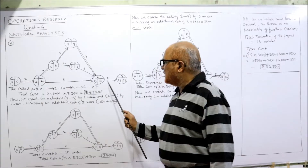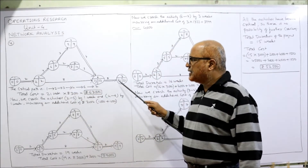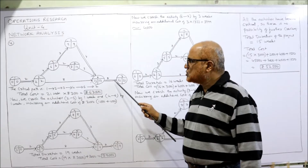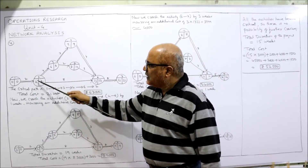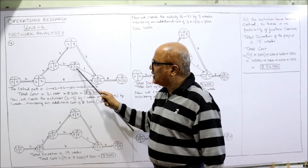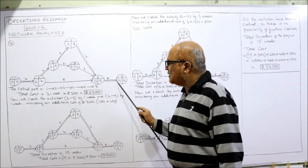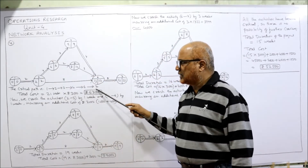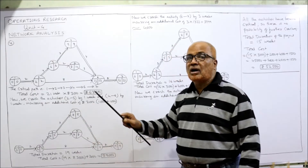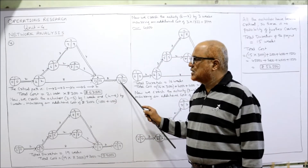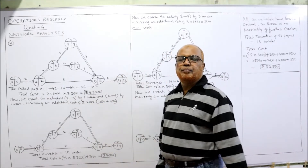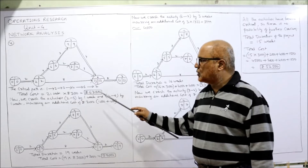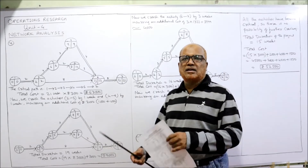Checking the path 1→2→6→7: 2+8=10, 10+8=18 — we need 21, so this is not the critical path. Moving upward: 1→2→3→4→6→7 — values 2, 2, 6, 6, 9, 13, 21 are consistent, so the critical path is 1→2→3→4→6→7. The total project cost without crashing: 21 weeks × 3000 per week = 63,000 rupees.